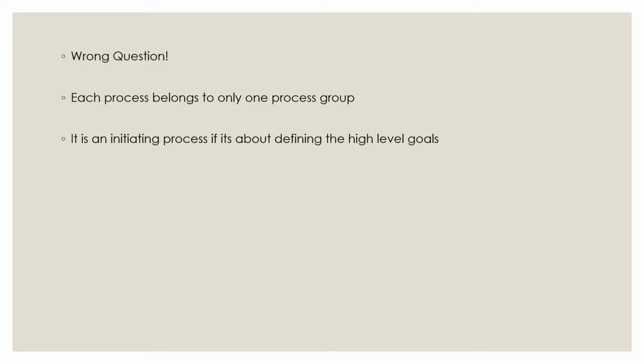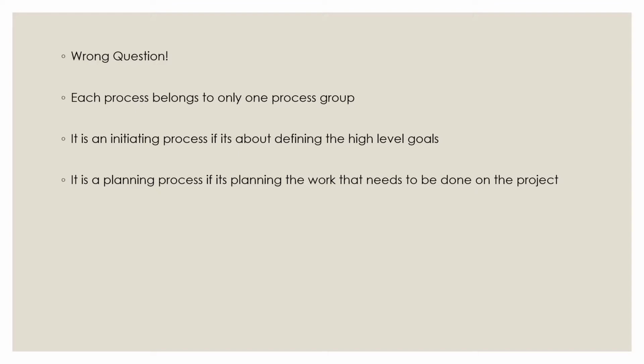If a process is talking about defining the high level goals, then it is an initiating process. It is a planning process if it's planning the work that needs to be done on the project. A key to remember here is that any process that is only planning the project work, not doing the actual project work, is part of the planning process group.